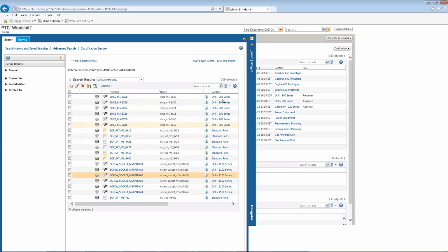So the benefit of this, once again, is to simply reuse the data that we already have, as well as reduce the cost. Those are 2 important items. And if you want to add another one in there, because we ordered them when we went in and ordered the 900 series, when we got to those same screws in the 1100 series, they were already ordered. So once again, lead time is now reduced, because we already have the hardware, or the motor, or whatever it is that we need in stock, so we don't have to wait for those items to be delivered.